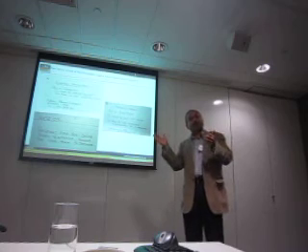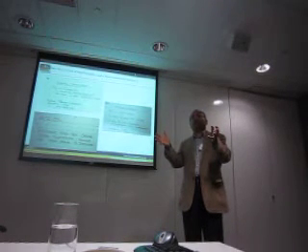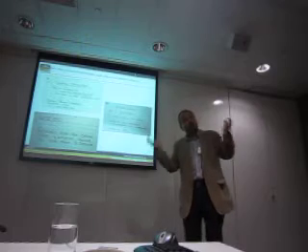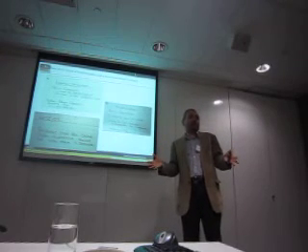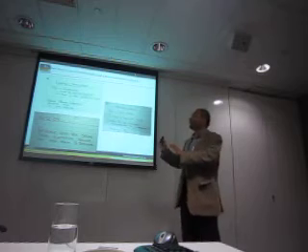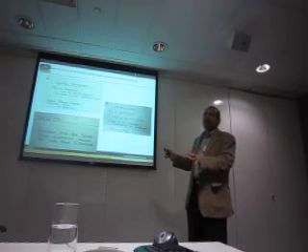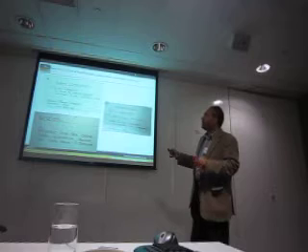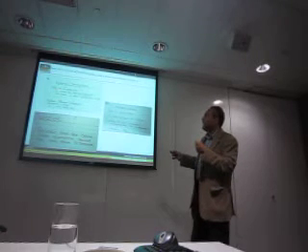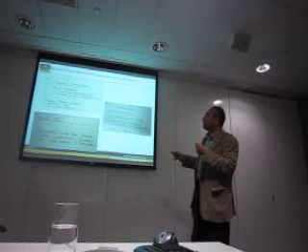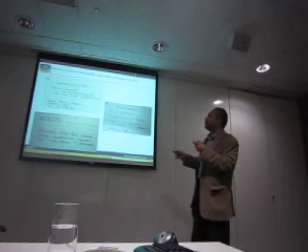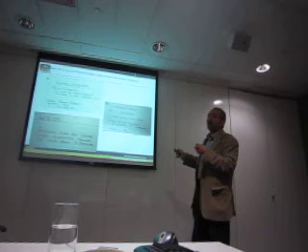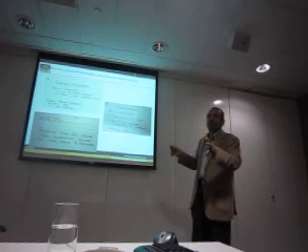And there is a book by Mike Cohn, a full book on writing good user stories. And there are heaps of books, by the way, hundreds of books on writing user stories, or how to write good stories. So these are very, very simple examples. My key business function is transaction. As a customer, I want to specify the details which are provided in this particular document so that I can withdraw cash. My role, how I will go about what I want with the end goal in my mind. And that has become a very popular format for writing functionality.